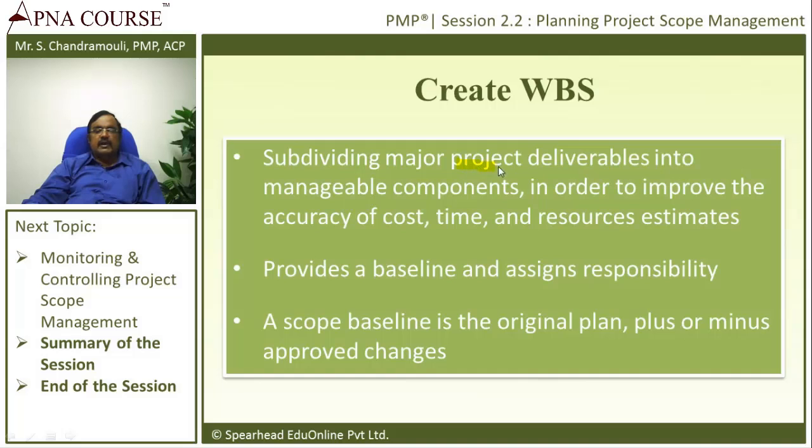So subdividing major project deliverables into manageable components in order to improve the accuracy of cost, time and resource estimates. That's the goal of developing the WBS. Subdividing major deliverables into manageable components in order to improve the accuracy. So it provides a baseline and assigns a responsibility.